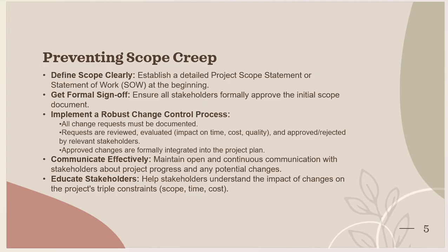Whenever a change request comes, the business analyst's key role and responsibility is to document that requirement, do the analysis of that requirement, and allocate resources to it. Then request and review the evaluated impact on time, cost, quality, and risk by the relevant stakeholders. Approved changes are formally integrated with the project plans.